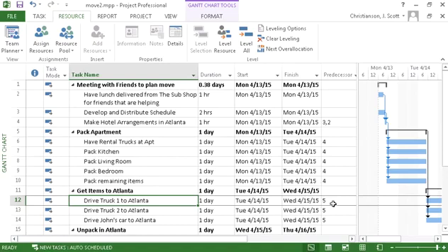But you'll notice here that I've made all of these driving tasks, driving down to Atlanta, dependent upon not the tasks involved in packing the apartment or a finishing task here, but in fact on the entire sub-deliverable of packing the apartment up. This is very useful because this way it makes our diagram much more clean, and also we may add other tasks in here as we're going along, and we don't want to go back and rethink these dependencies.